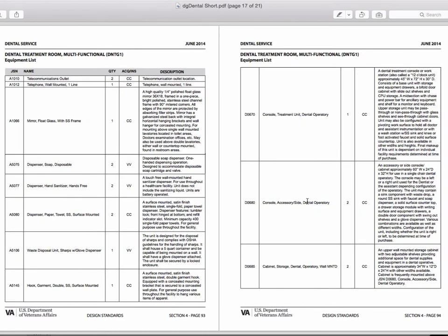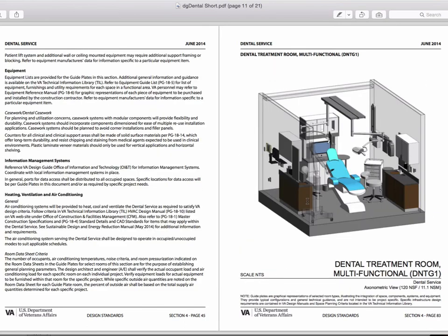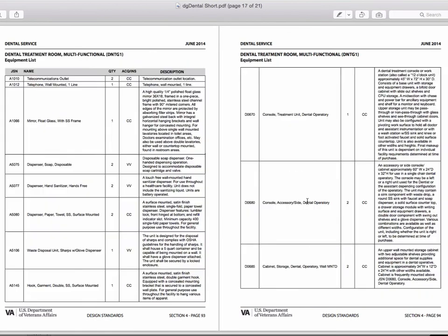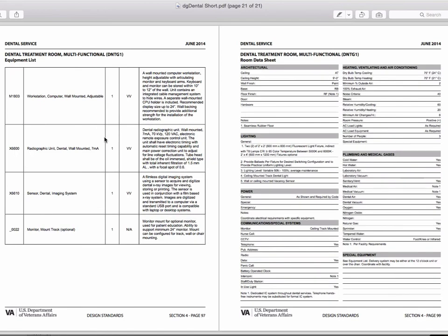This could be done in Excel obviously or in Word, but from BIM, a file like this can actually generate the list of equipment. And as many of you know, the list of equipment also have IDs called JSN numbers that track individual pieces of equipment. And you'll see more of this in the instructions as we go along. So essentially, the material that's already being produced, regardless of using BIM, is essentially what we're asking to be put into a format that is consistent.